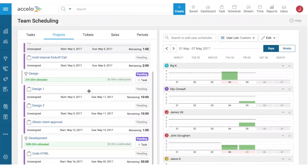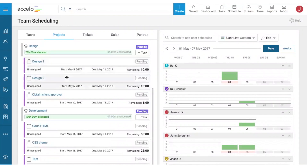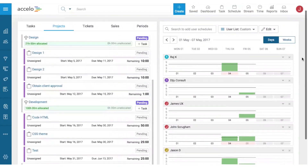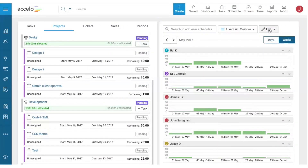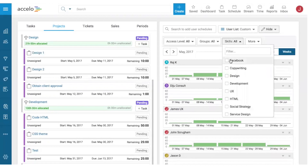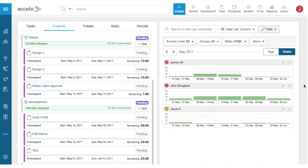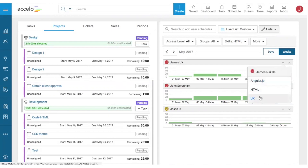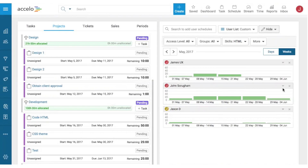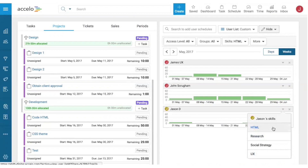On the left-hand side you see all the tasks or resources needed; on the right you see how busy everyone is. When scheduling at the beginning of a project, looking weeks out, the team typically switches to the week view. Then I can filter by skill — for example, filtering by HTML pulls up the three people on the team who have that skill. You can see their individual skill sets: James has three, John has more, and Jason has a few others, but all share HTML.